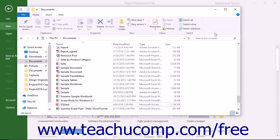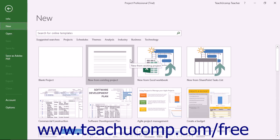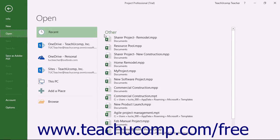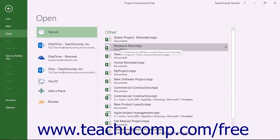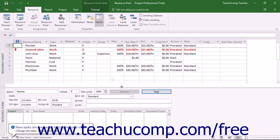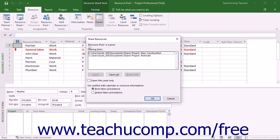In the future, if a sharer project file that was linked to a resource pool file is deleted, the assignment detail information from the deleted project still appears within the shared resource pool file. To clear this data from the resource pool file, you must break the link to the resource pool file. Open the resource pool in read-write mode, then click the Resource Pool drop-down button in the Assignments button group on the Resource tab in the ribbon, and select the Share Resources command to open the Share Resources dialog box. In this dialog box, select the name of the deleted sharer project file to clear from the resource pool, and then click the Break Link button.